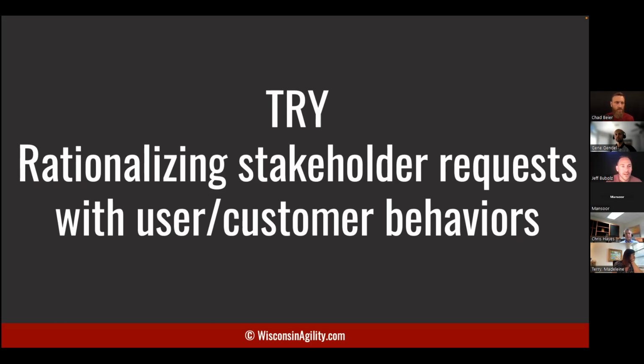An example here, there was a client I was working with once, and they were about to make a multi-million-dollar decision to do this integration. And what we did is put a button out there, because all the stakeholders said, we need to do this thing. And we put a button out there that says, fill out your loan now. And no one clicked this button. And that was going to be where the integration started on this path. All it was, was a button to nowhere that said, call your loan officer to learn more about these loans. And so what we learned in those 2 hours of development was we should not spend millions of dollars to build these integrations out.